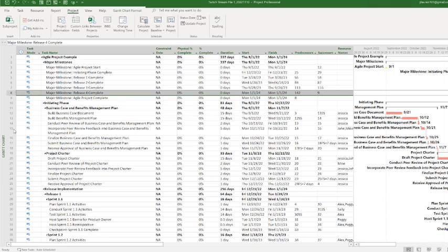Then there's unique ID, which I'll add after I walk you through what this task information window does. Unique ID doesn't change. So the moment you input a task, the unique ID is made. And once the unique ID is made, that's it. It is associated only to that task. And if you delete that task, it will not be used again, unless, of course, you open a new project file.